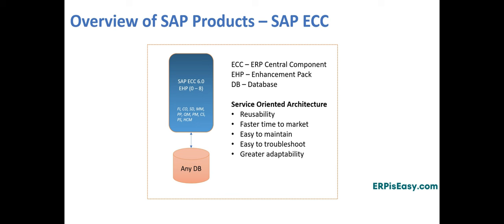Dress rehearsal. Just before the actual go-live, a dress rehearsal is held to test it out. Every step will be performed during the dress rehearsal to replicate the exact actions performed during the go-live process. This process will assist in proactively identifying issues and ensuring a safe go-live.